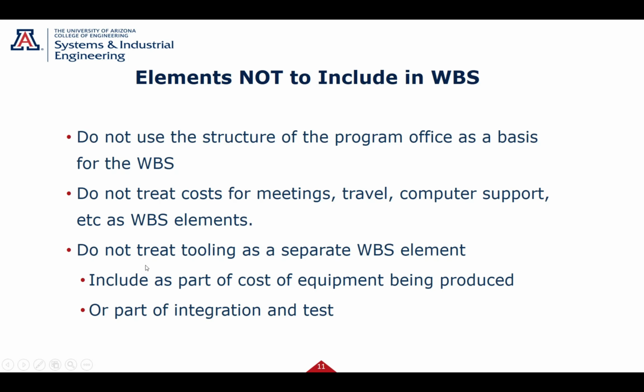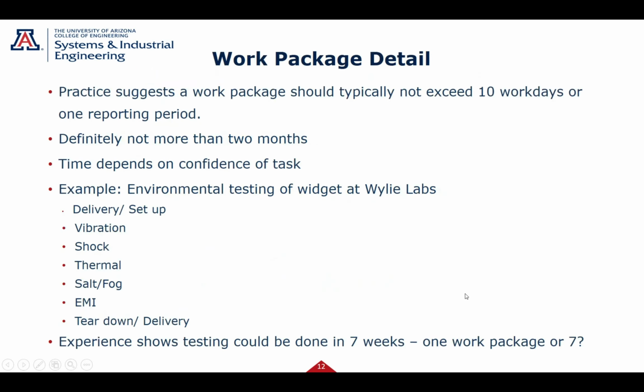Usually for those of you who are doing manufacturing, you don't treat tooling as a separate element. It's included as part of that element you're doing. So if I need tooling to do radar, it's part of the radar one. I don't have a separate one as part of just the general program. So